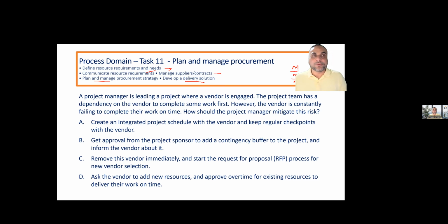And to make those type of contracts, we need to have a strong financial audit. And the third thing is the time and material type of contract, where we define the unit rates for the resources to be acquired, and then we pay them accordingly. In Agile, we can prepare a master service agreement for the whole project, and for each feature we can make addendums or appendices, packages accordingly based upon the requirement. And that's how we do the Agile contracting and Agile projects.